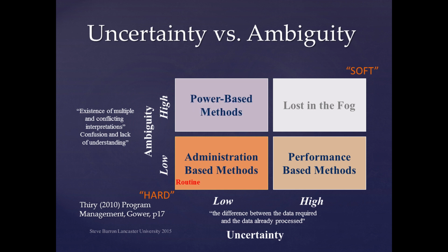For making a movie-type project, the management approach needs to consider how stakeholders will be involved in the project and determine how to navigate through the opinions and demands of often senior players. This requires management expertise to include ways to deal with power-based relationships, such as negotiation and effective stakeholder management.